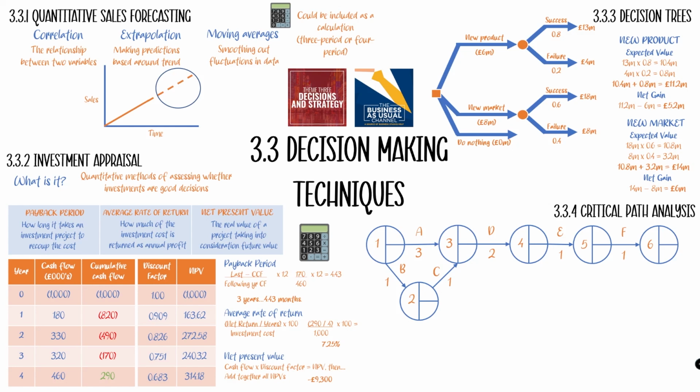I'll explain the theory behind these as well, but if you know the process, then doing this is actually pretty straightforward. So the first step is to calculate the earliest start times. If you look at our nodes, they have the section on the left which basically says the node number 1, 2, 3, 4, 5, 6. The other half is split into two quarters. The top quarter, that's where our earliest start time is going to go, and that basically references the earliest point at which the next activity can start. So the earliest start time for the next activity.